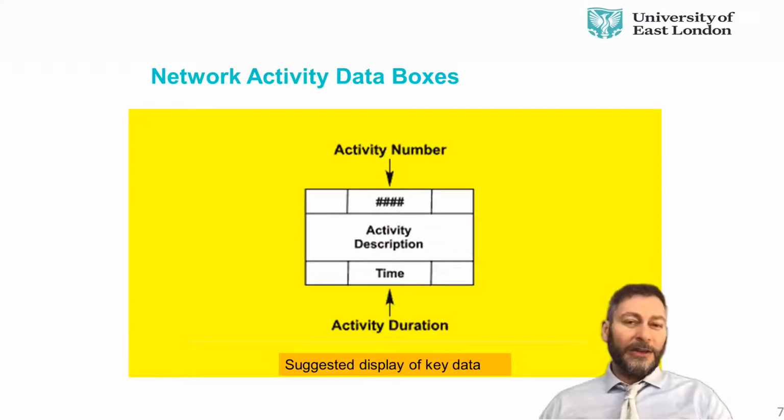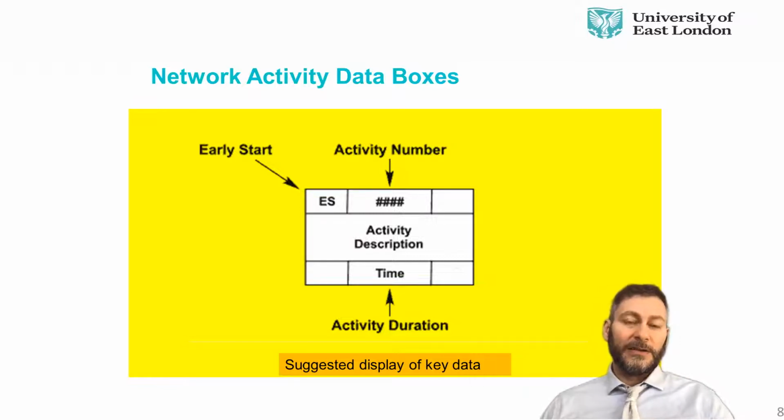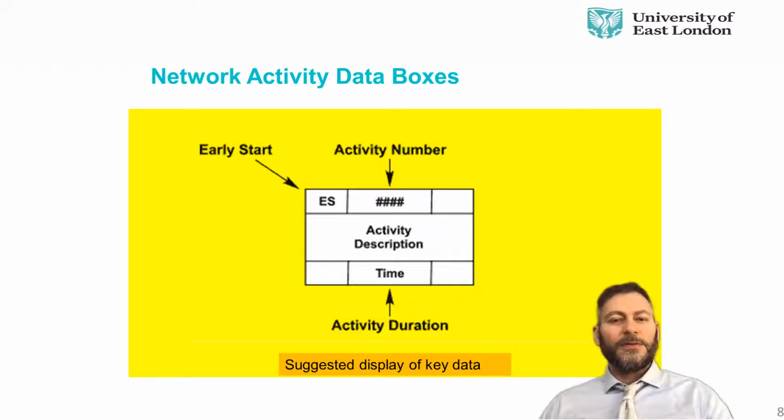Now we get to the calculation part, and this is where people get a little bit tricky. But all you need to know are these basic facts. On the front there, we put the earliest possible start of an activity. For instance, the first one is 0 days because it's the first activity. That's the earliest start. But we just saw a second ago that design can't start until both B and C are completed. So they have to wait for the other ones, and then you can indicate that in the earliest possible start. In the calculation, it's just a straightforward calculation.